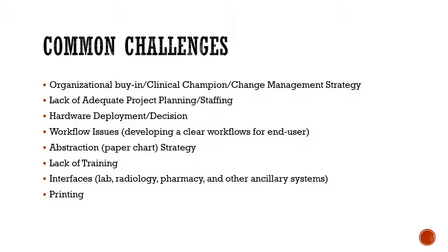Interfaces, this is more referring to understanding which types of results will come back to your system, which types of systems are already tied to your vendor, your technical vendor. If there are licenses that you need to sign, make sure that these are all signed and you've actually done this kind of testing to make sure that you have results coming in from lab systems, from pharmacy. If you e-prescribe, make sure you can e-prescribe without a problem. And some of this depends on the scope of your technical solution.